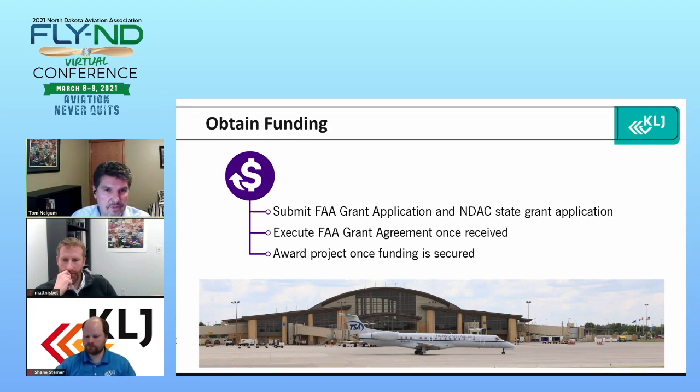This really holds true with the state. Sometimes, or most of the times, we have projects bid before their June state grant meeting. Some of the discretionary projects we won't. So a lot of times what the sponsors do, they'll put in a state grant application based on estimates, and then following up the next year, if there's money to turn back, you turn it back when we're closing it out, or if you need more, you can request more from them at that time, a supplemental.